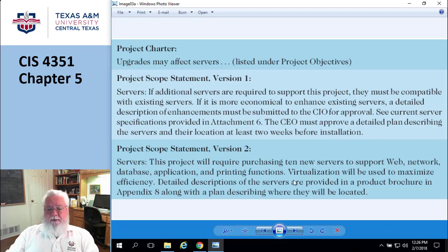Okay, and so we're going to talk about the sort of techniques. There's basically 3 choices that the book talks about. One of them is by product. In other words, by deliverable. Here's what I want to happen. I want this deliverable. So you just list the deliverables, and then the rest of the project just kind of feeds into providing the deliverable.